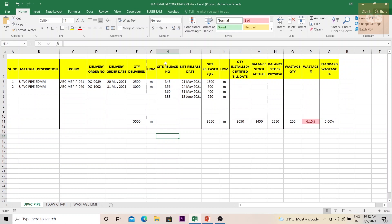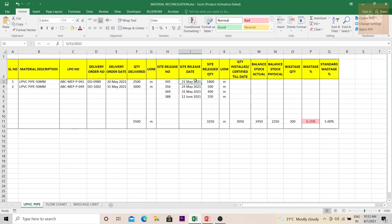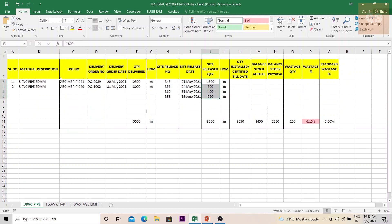To understand how much material is being released to site, proper documentation needs to be maintained by the store department — a book with a reference number. Whenever a supervisor, foreman, or engineer comes to take material, the details — quantity taken, date — can be noted down, and a signature obtained so you know which foreman or supervisor took that particular material to site. For example, under site release number 345 on a given date, this much material was taken, and so on.